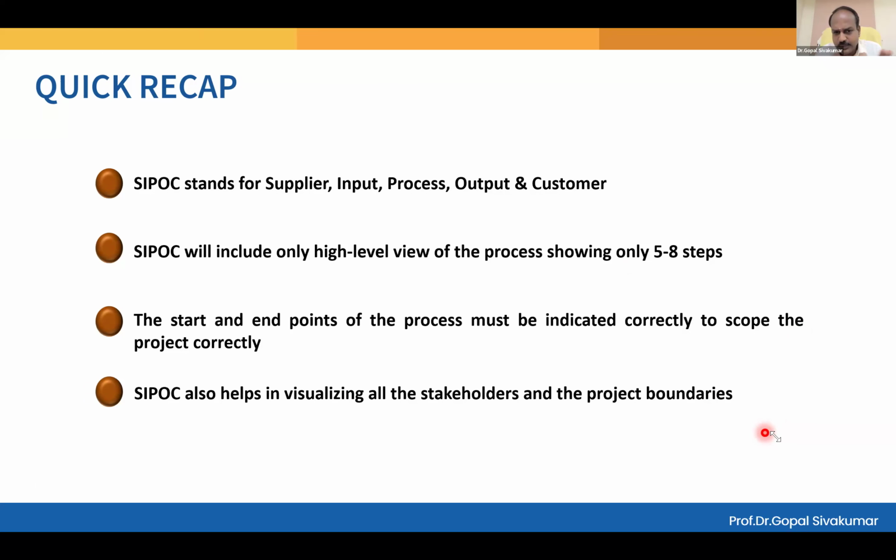What is the ending point? What are the important steps, important activities that are happening? And for each activity, what are the inputs needed, and who will supply the input? And for each activity, what will be the output, and who will receive that output? This piece of information, you should be able to submit along with the project charter, to boost the sponsor's confidence in the ability of the project team.